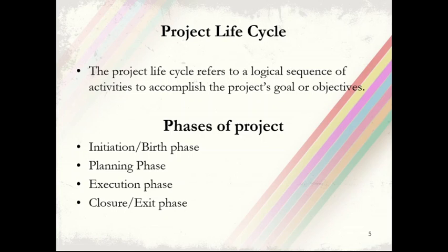The final closure phase emphasizes releasing the final deliverable to the customer or handing over the project documentation to the business, terminating supplier contracts, releasing the project resources, and communicating the closure of the project to all of the stakeholders.